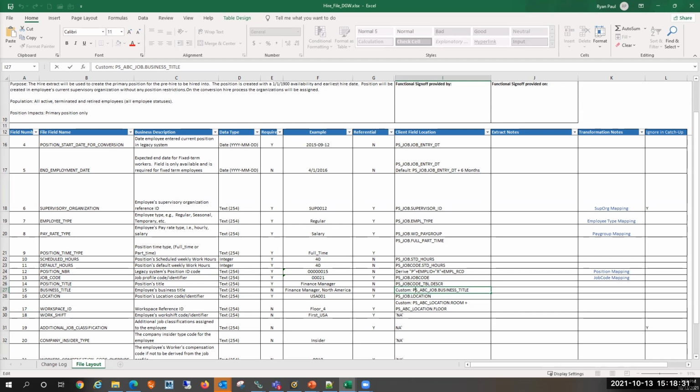Right. It may be that, okay, well, we're either going to outsource the backfill of PeopleSoft and get our people on, meaning you yourselves would backfill PeopleSoft, and you're going to move your PeopleSoft team to the new software to support the conversion and learn and do whatever. Or you say, nope, we need to leave one person on. That also helps figure out how much support do we need from our partner.